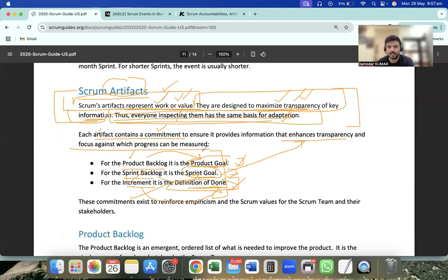That's our product goal. And what will the product backlog be? For building a community, we need to have the website. We need to have the login and sign up option. We need an option to create a profile. We need an option to enable chat or ask a question. We need an option for replying, and the permissions should be available to all of the users.